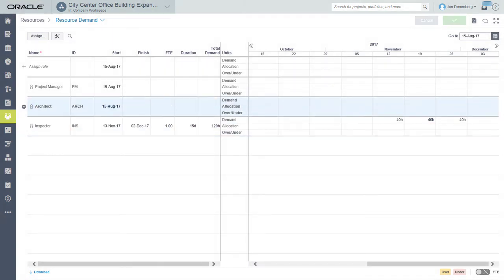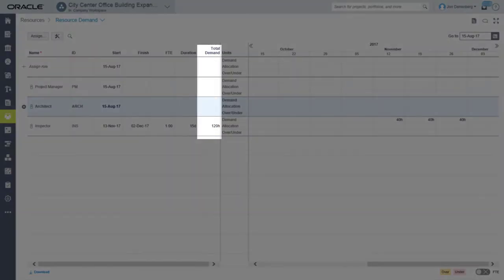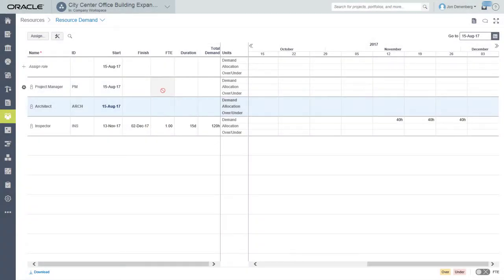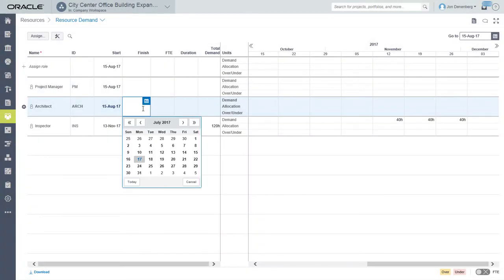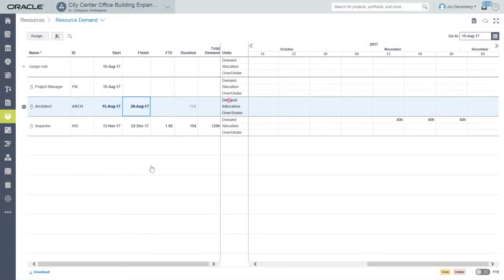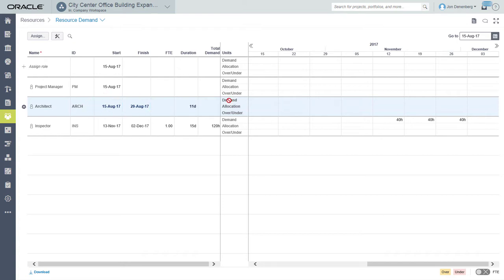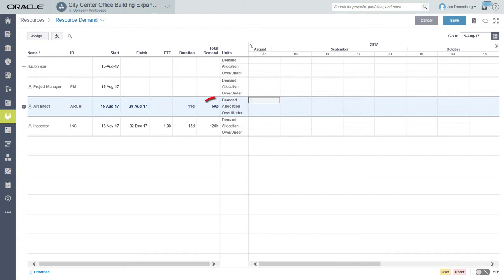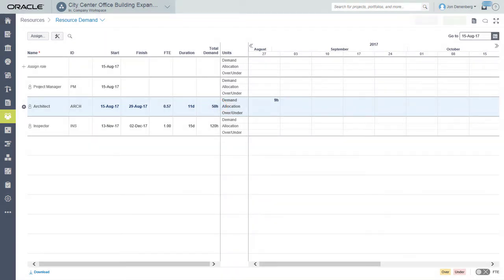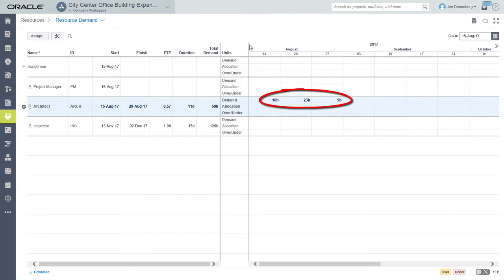Or use the Total Demand column. Again select start and finish dates and then type the total number of hours needed for the role. The hours are distributed linearly over the selected time period on the spreadsheet.